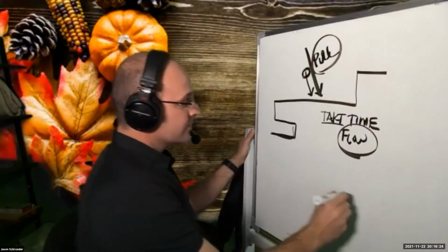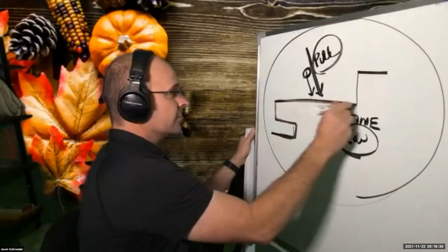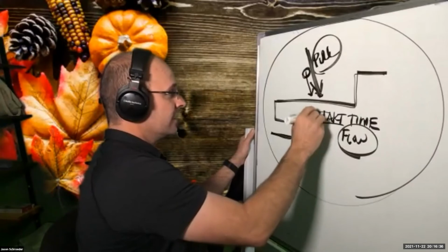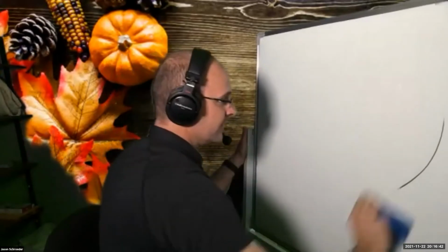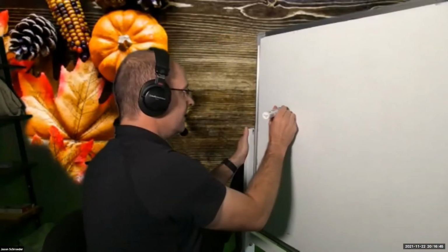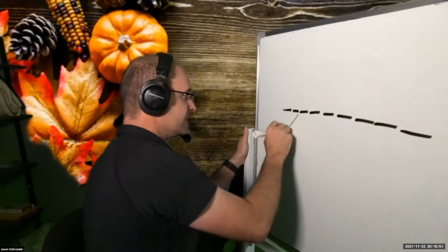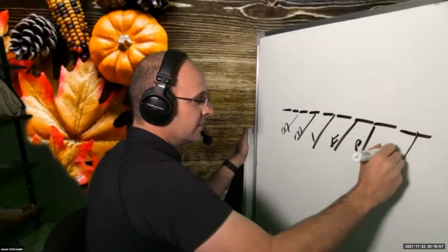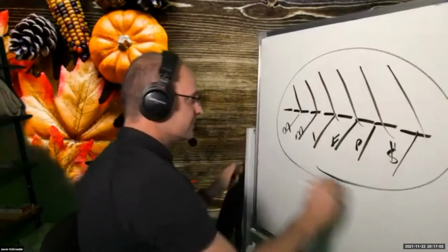And so that's what this whole Scrum system is attempting to say, is that you have to have your overall long-term plan, and then you have to be pulling information, materials, manpower here at the right time, which is where the Scrum short interval planning cycles come in. I hope I'm making this clear. If we have a project and there's a rhythm to it, then we need to align materials, manpower, information, equipment, permissions, costs, everything aligns to that rhythm. And so that's how the systems tie together. I just wanted to make sure that was clear, because I think that's super cool.